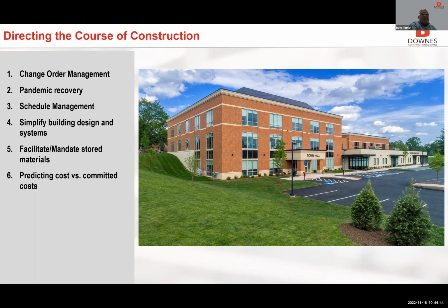Change order management. It is not a good term in construction, and nobody likes it. And what I think is important on change order management is to have a plan as to how you're going to handle change orders right from the beginning. What happens in change order management is not necessarily just putting out a sketch, getting a price, and issuing an amendment to a subcontractor agreement. This process needs to start right at the beginning of the project, whereby you set the rules and the guidelines as to how and what can be charged in the change order process.